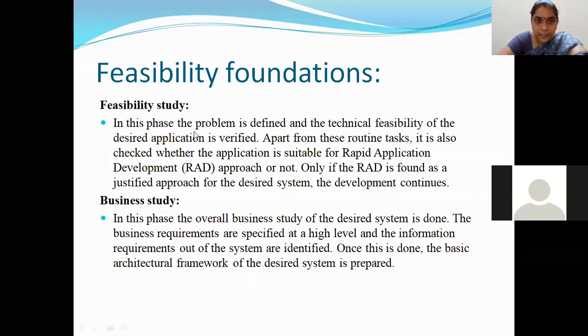So what you are doing here is, in order to solve this problem, the technical feasibility of the desired application is verified. Apart from these routine tasks, it is also checked whether the application is suitable for rapid application development approach or not. I already told you DSDM always delivers the product quickly, right? That is, it is going to follow RAD, rapid application development. First of all, I should verify whether the project I'm going to develop is suitable to develop rapidly, to implement rapid application development.